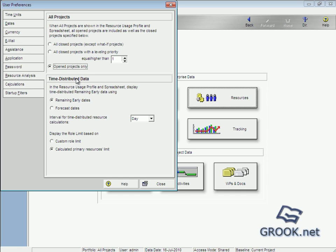And here we can choose remaining error dates or forecast dates. This is to specify dates and time interval used to calculate time distribution date for resource spreadsheets and profiles.